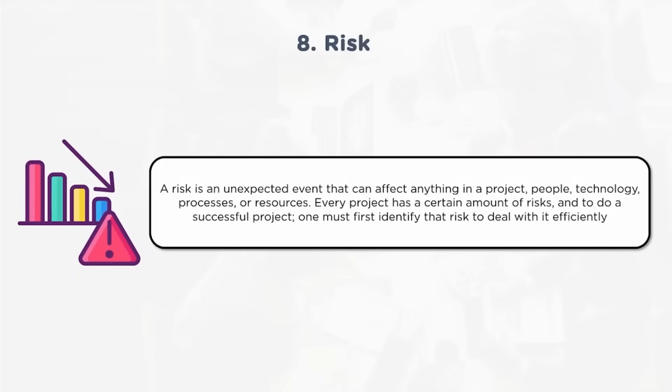Further, procurement. Whenever a project is taken up, the organization doing the project cannot create everything, cannot develop everything in that project life cycle. So the organization would make a decision stating that some of the deliverables we make ourselves, and some of the products and services we purchase. To purchase, that has to happen from a specific supplier. You cannot go with every supplier. You should evaluate the suppliers, qualify the suppliers, then select and onboard the supplier, and then get the services or products supplied by that particular supplier.